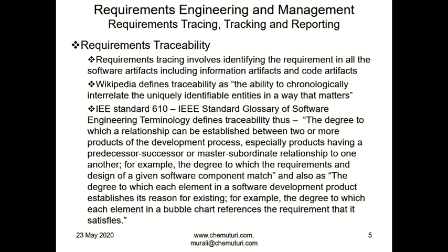See, the user gives the requirements and we derive the ancillary requirements. And both these requirements must be documented in the software requirement specification or high-level design or functional design specification or whatever the first level design, and then in the final detailed design or program design or detailed design specification or low-level design, and then in the code artifact.